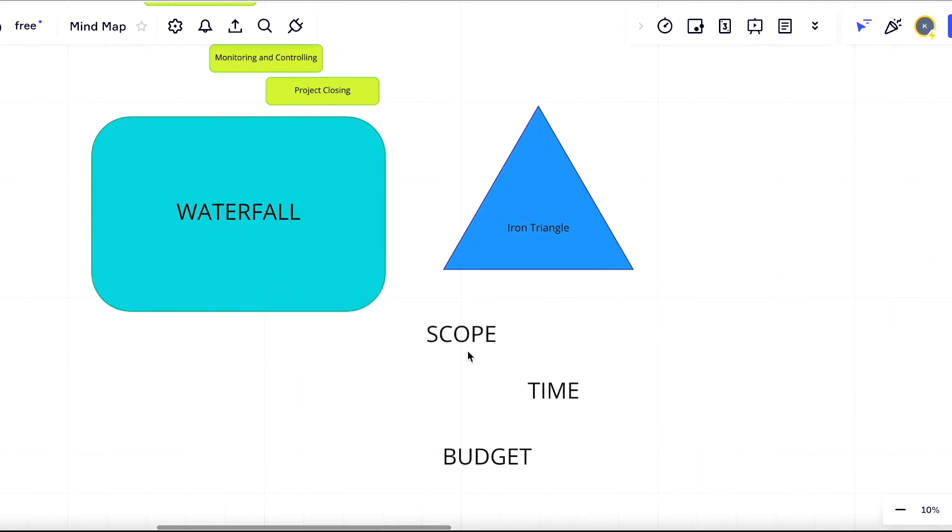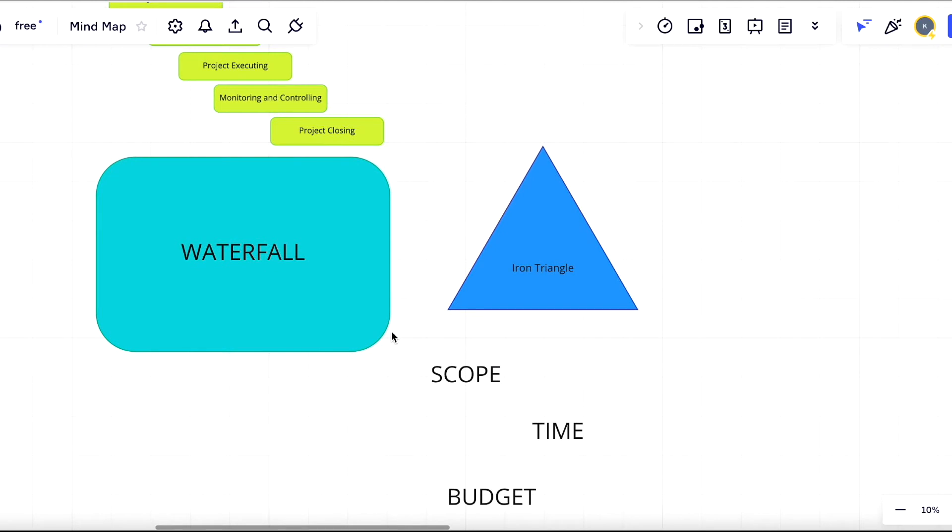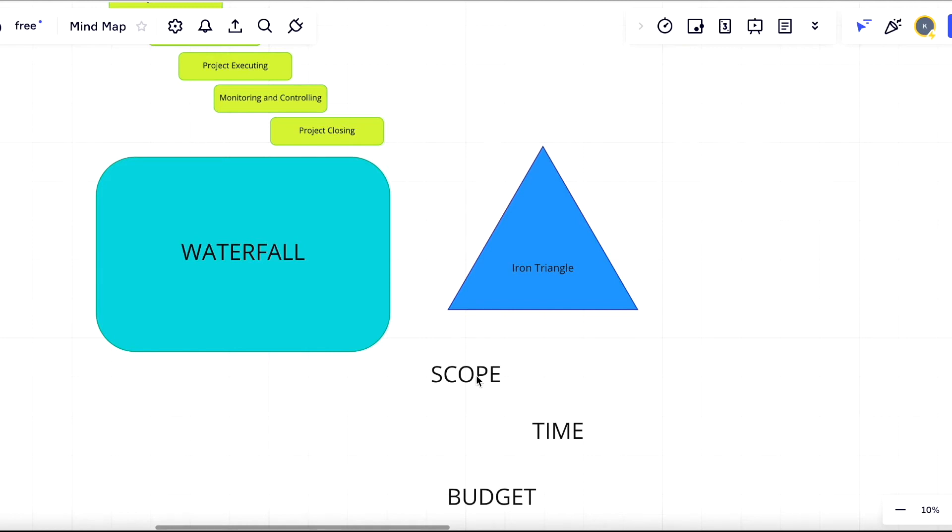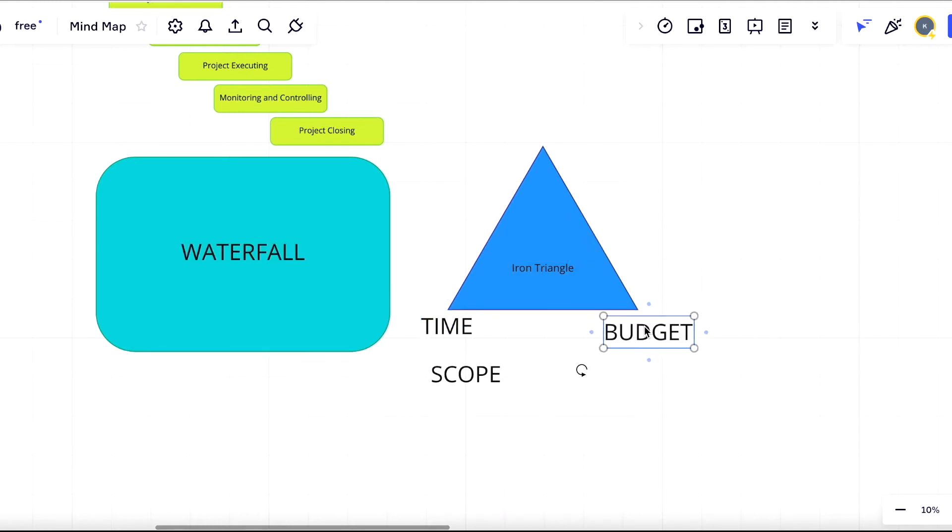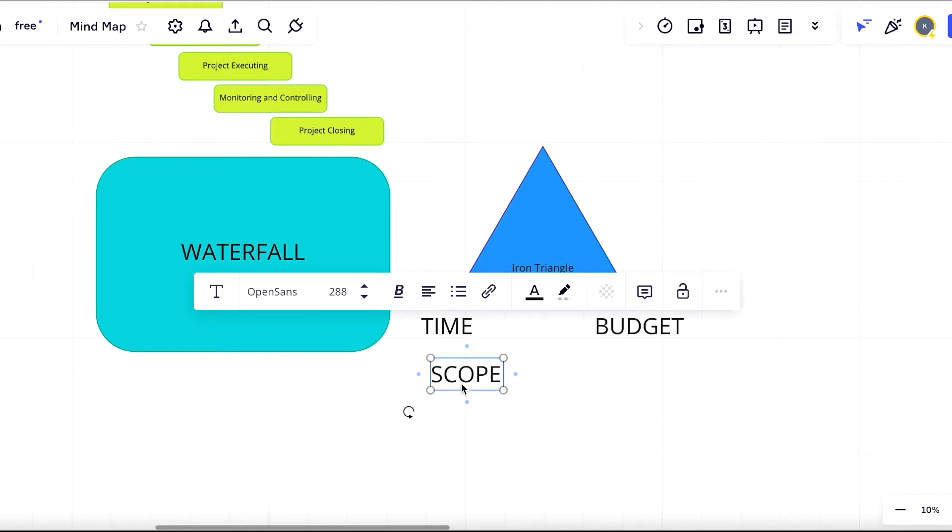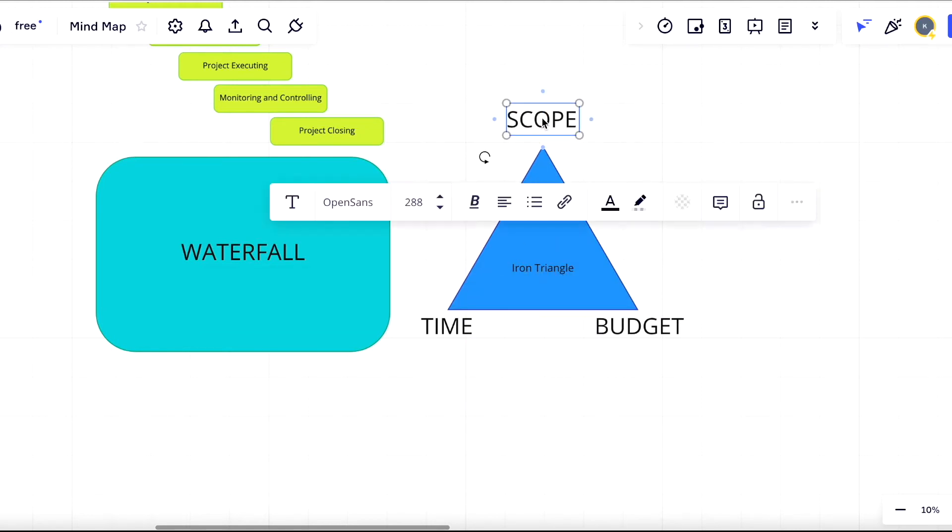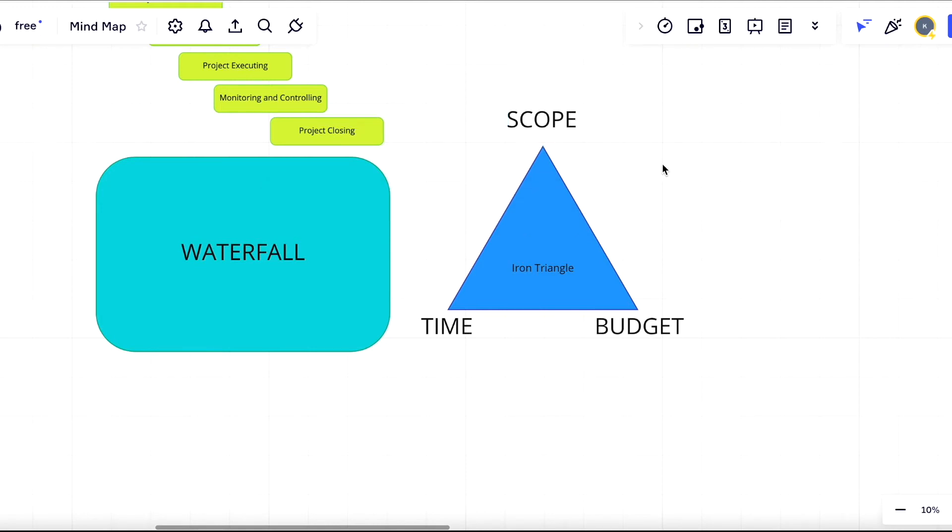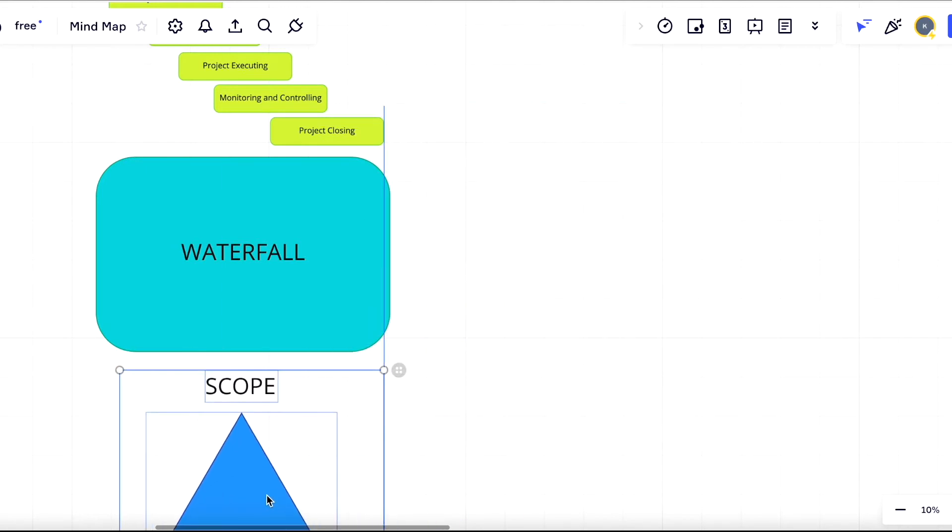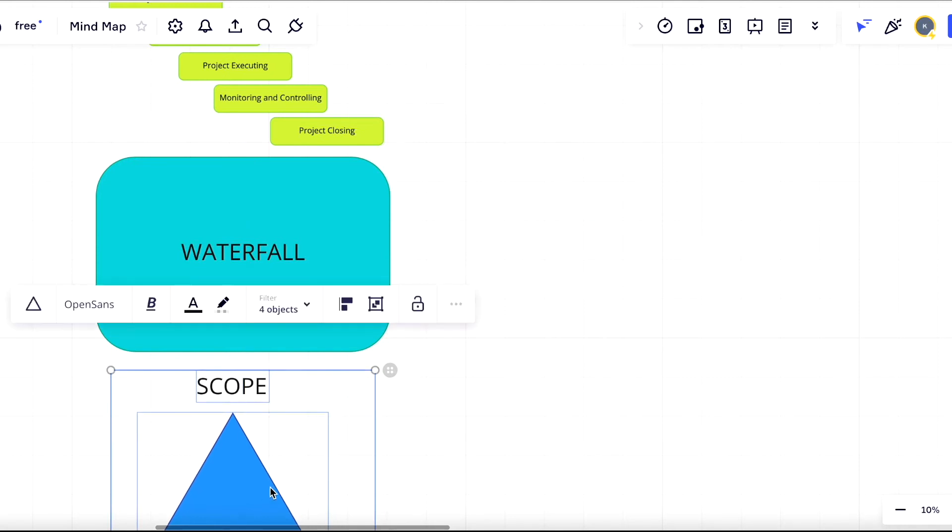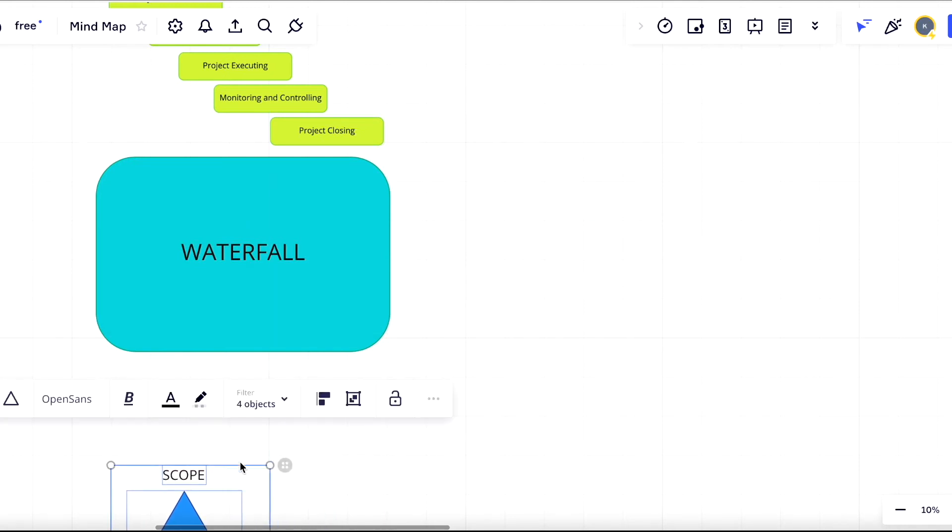When it comes to waterfall, normally these are projects that have only that much time or that much money to deliver a project. This means that time and money are the general constraints. If we have those constraints on the project, most likely waterfall is going to be the most suitable methodology, whether we have a specific deadline to deliver the project or a fixed price project when we're not able to be flexible with project cost. This means time and budget are going to constrain our scope of work, and the scope of work will be selected based on the amount of time and money that we have.